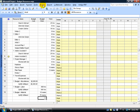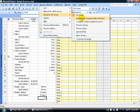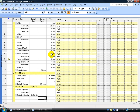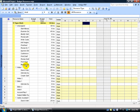After grouping by Resource Type, it groups by Cost, Material, and Work, with the Budget type shown because we have a column for it. For Work, it groups all work resources together and gives us the total — 116 hours. All I have to do is look over here and see we've got 600 hours budgeted — we're well within budget. Scroll down to see Materials: we have 15 reams as our budget. Since we haven't assigned any materials yet, there's no total to display yet.